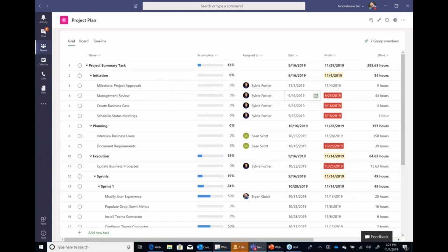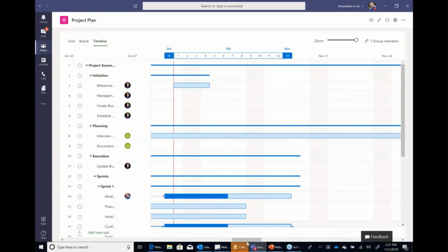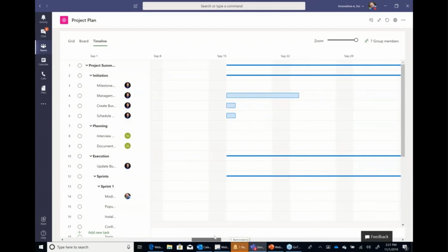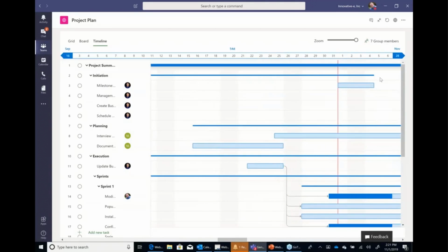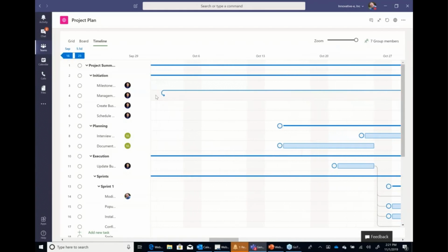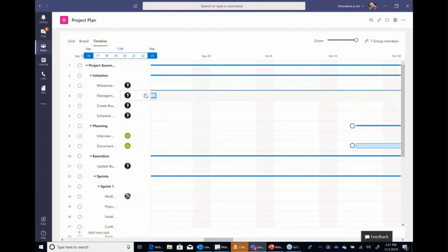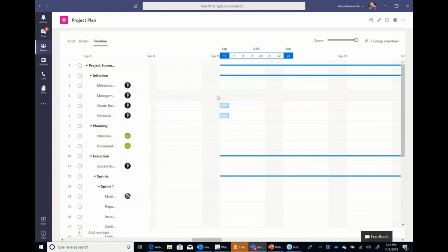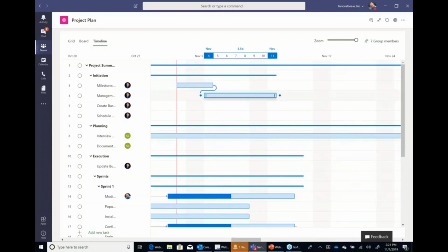And what I haven't done here is really hooked up these tasks to be dependent on one another. So I'm going to go in my timeline. I'm going to sort over here to where these tasks are located. And I'm going to draw a parallel between the first task and the second. Notice how I'm still able to click and drag that across and make that connection. And it made the connection. And so now those tasks are associated with one another as dependencies.